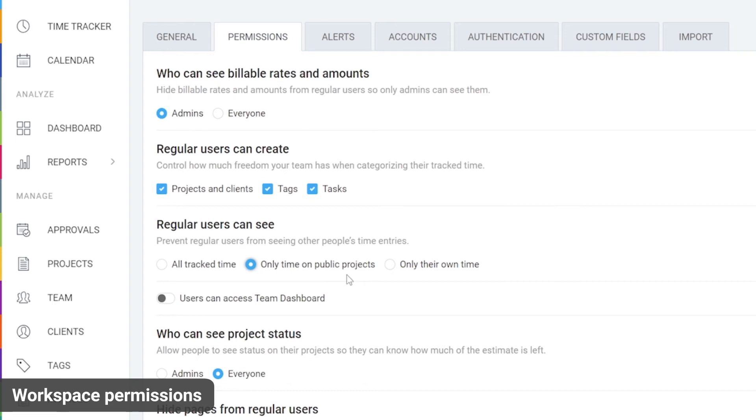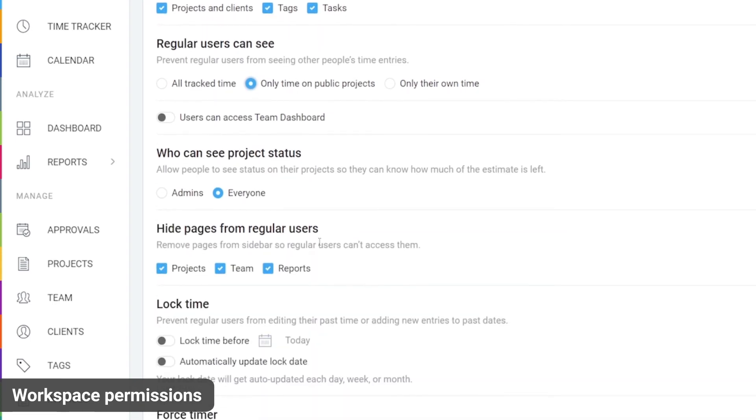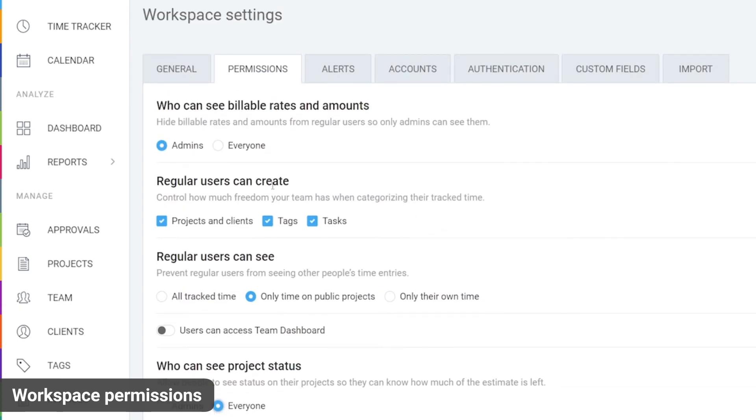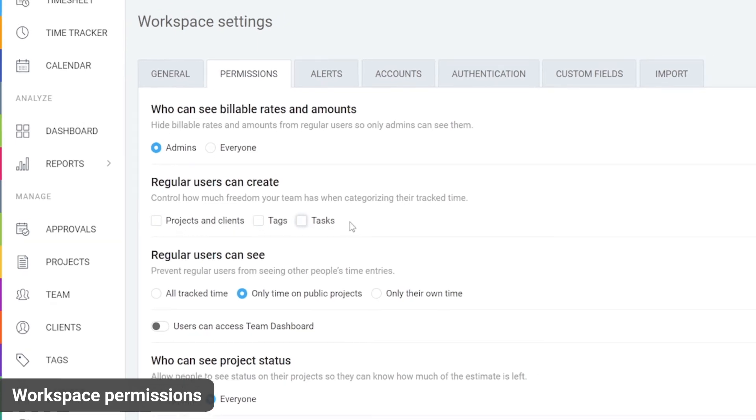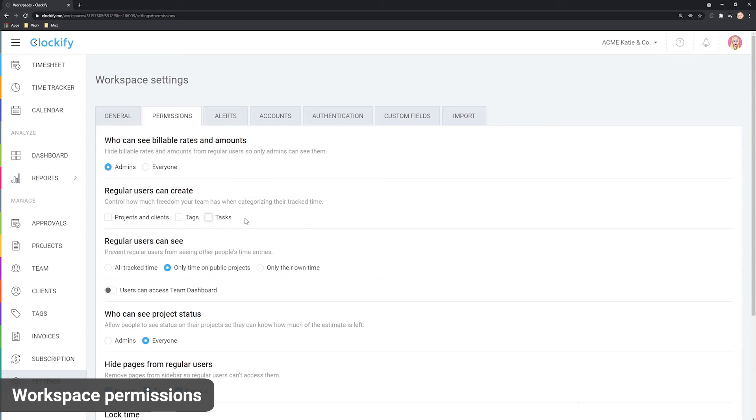Below, you can control whether users should be able to see tracked versus estimated time on projects and overall progress on projects they are part of. And finally, you can prevent users from creating projects, clients, tasks or tags here. Just keep in mind that when someone creates a project, they automatically become that project's manager.